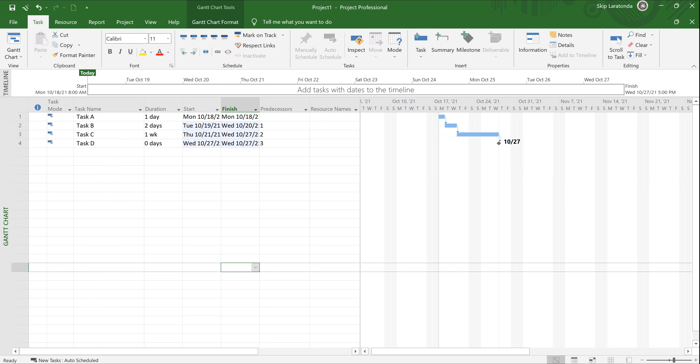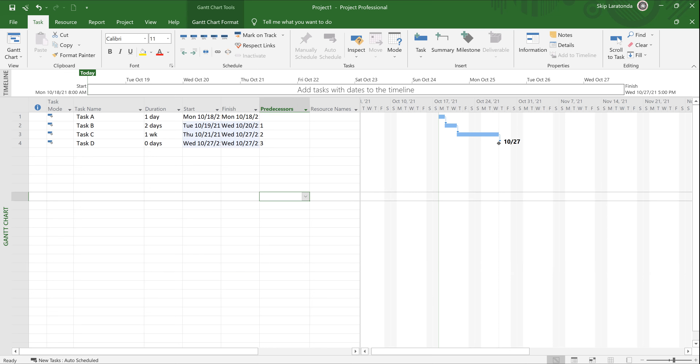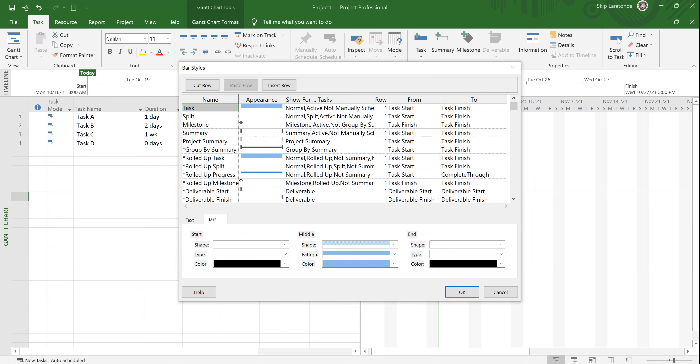Task A doesn't have a predecessor — it's the first task. Task B starts when Task A finishes, Task C starts when Task B finishes, and Task D starts when Task C finishes. So we've got the flow going. Notice there's color on the bars — if you right-click in the Gantt table you can pick Bar Styles, and it'll give you a legend to tell you what the colors mean.